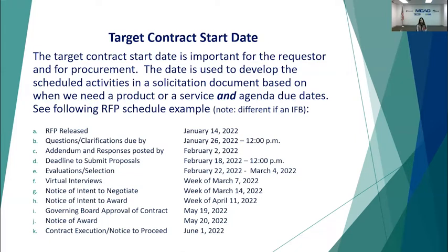In other words, how long does it take for somebody to put a proposal together, depending on what type of work you're requesting. Our policy is no less than 10 business days. For consultants, I don't see anything any less than 4 weeks. It can be up to 6 weeks on complex procurements. It could be 3 months. So again, just an example.